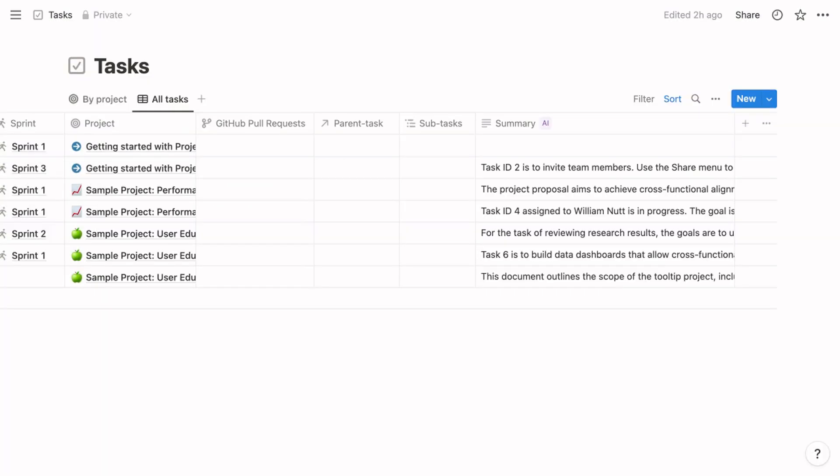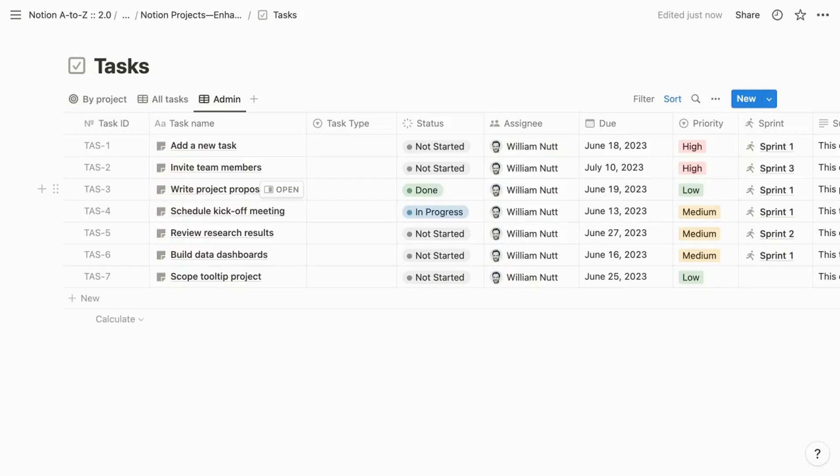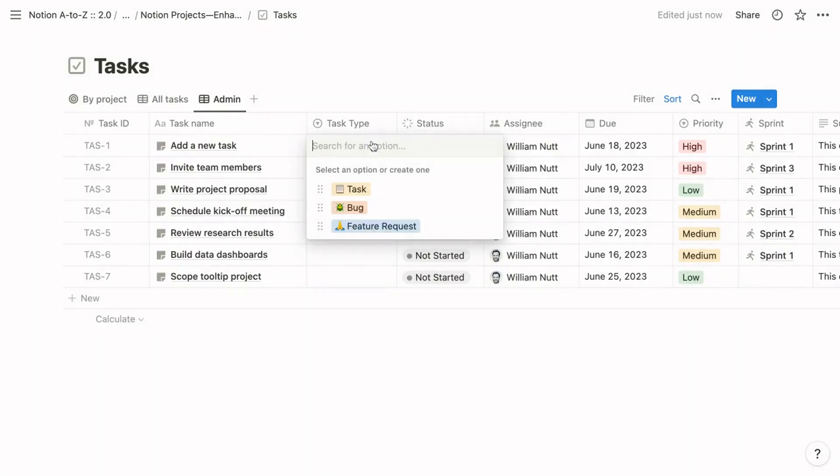What may surprise me most about the Notion Projects system is that the tasks database excludes any way of indicating within the properties the type of task—in other words, whether it's a task, a bug, or a feature request. That'd be a helpful visual, and it'd also enable grouping and filtering. My template includes a task type property that populates automatically when you choose the corresponding template. Then the task's type is displayed in all views that use the card format, including the board within the project template.